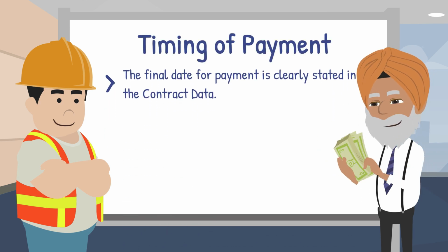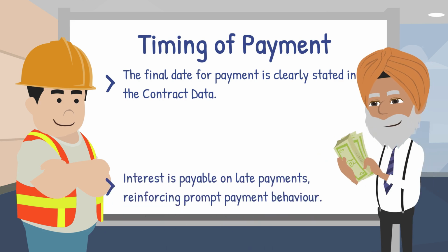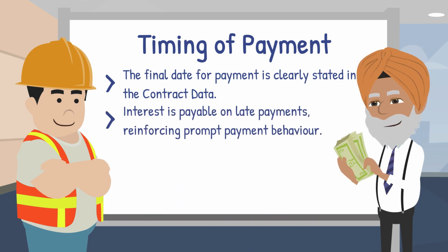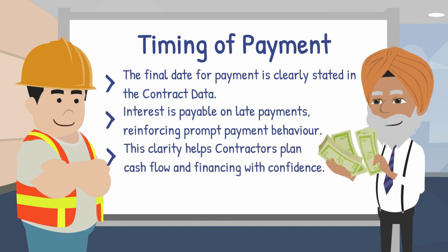The final date for payment is clearly stated in the contract data. Interest is payable on late payments, reinforcing prompt payment behaviour. This clarity helps contractors plan cash flow and financing with confidence.